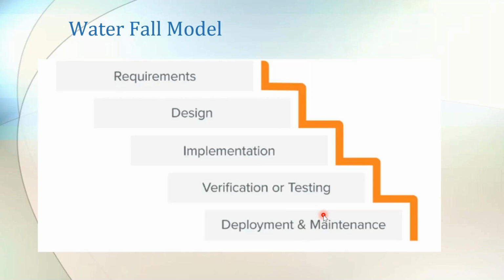I have to wait for 3 months to 6 months, because before this DevOps model, we were following a model called waterfall model, where I cannot directly get to the actual output. I have to go through all these phases. So even if it is a small star rating update in my screen, a small change in my web application, I have to go through all these phases. And all these phases are maintained by different sets of people. Requirement gathering would be from a different team. They will gather the requirement and give it to the design team.